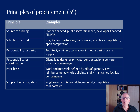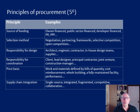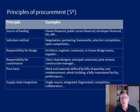If partnering is the answer, then the question is what selection method will we use. Partnering is not the only answer — we could use negotiation, frameworks, selective competition, and so on. When discussing design-build procurement, if design-build is the answer, the question is where does the responsibility for design lie, and there's a range of five choices offered here. Each box has three dots at the end, indicating there are actually more options than listed — these are not scientific terms, just things that occur in practice.